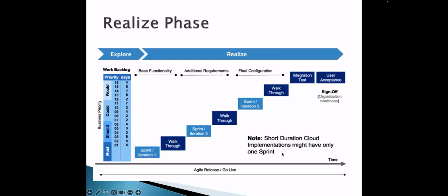So now when the product is 100% configured, by the third or fourth round of walkthrough, you can demonstrate the end-to-end product. And now the customer is, in a way, indirectly involved in the project implementation phase. You are involving them in every phase, and we are not keeping the testing to the end of the project. In between itself, they are doing a kind of testing. They are giving you suggestions. If something is not as expected, we are correcting it. So there are very few chances of last minute surprises.